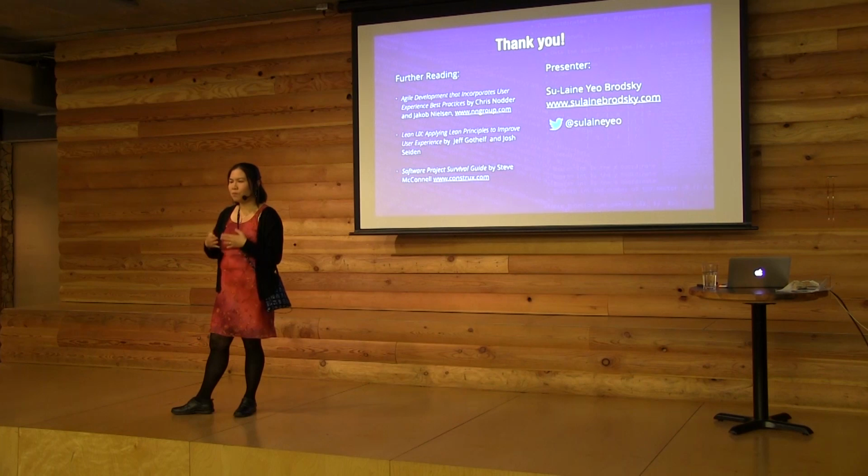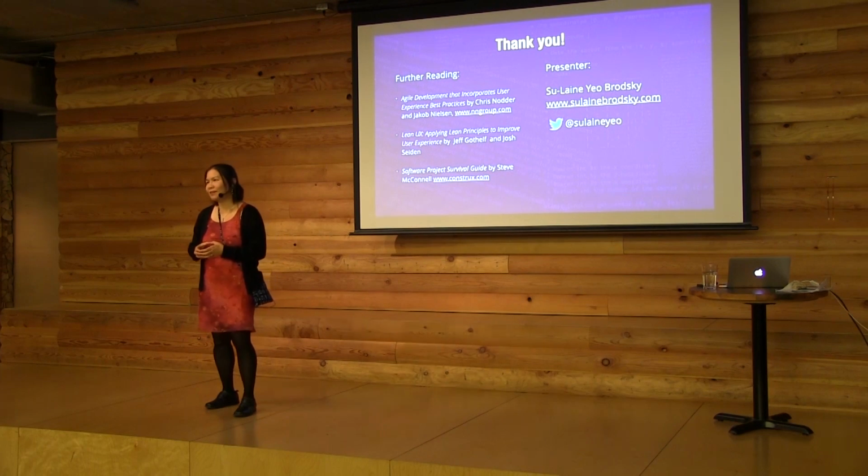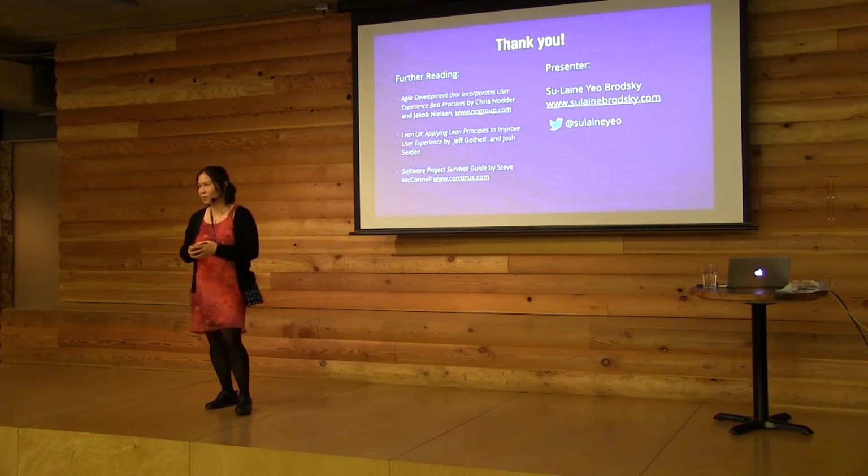But first of all, you do need to consult with the developers on feasibility, so that you're working within the technical constraints, and you want to find out what those constraints are early on. So I always start projects asking what the constraints are, and developers are usually quite happy to tell you that. And then if you come up with an idea that you think is possibly hard to implement, find out how hard it is.